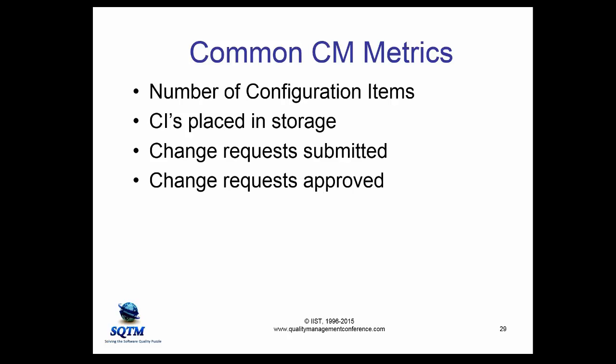How many have been approved? And prior approved CIs modified. So once a change request is approved, most of the time that's going to result in you having to go back and change requirements, design something. So if that approved request needs to have these modified, have they been modified?